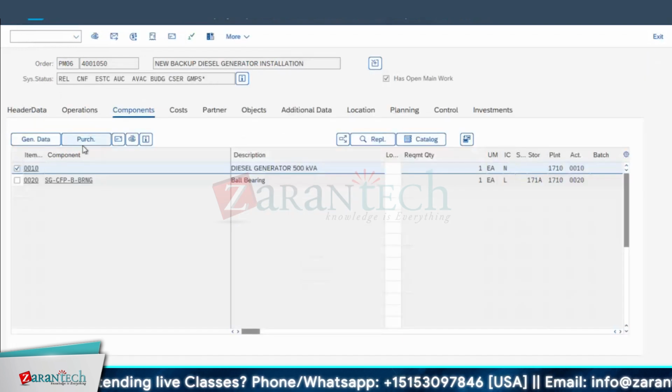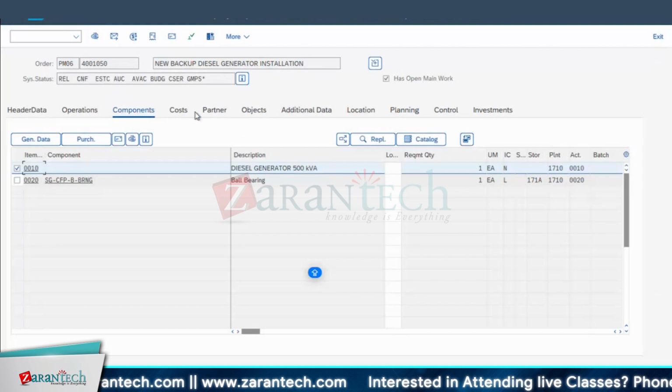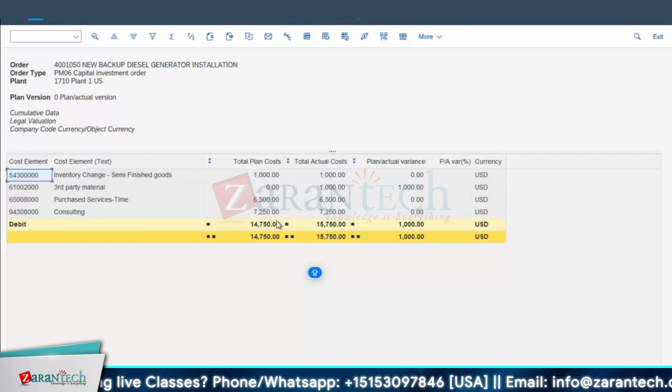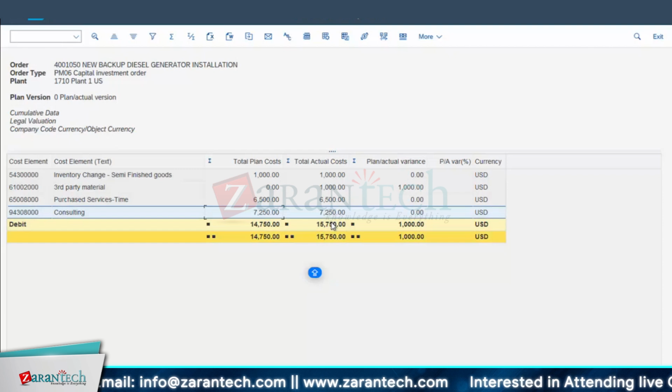This price is that which was not planned. Understood? Yeah, you added that price in the purchase order directly. That's why, there was no plan. So plan is 0. Actually, you spent 1000. Actual we maintained in the purchase order directly. That is the way variance has come. Now it's still fine. The rest everything got settled, this external services part, consulting part, all those things.